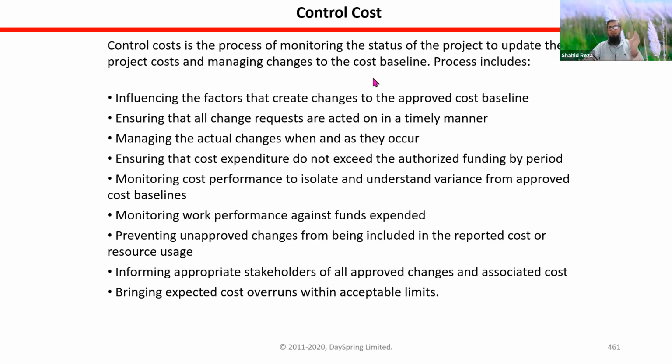If, after setting the baseline, any change comes and that has impact on the cost baseline or any baseline, that must follow the change management process as per the PMBOK. Without following change management and the perform integrated change control process, you cannot make any change.